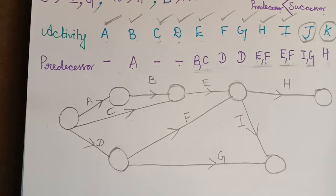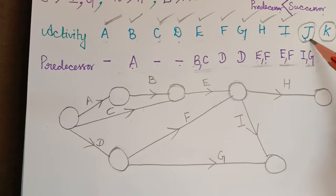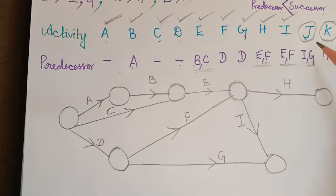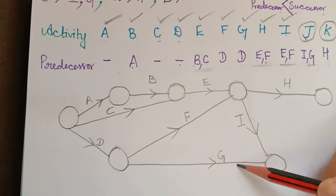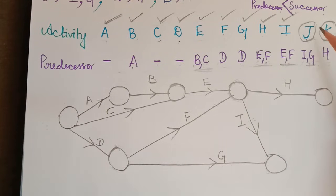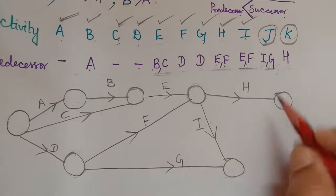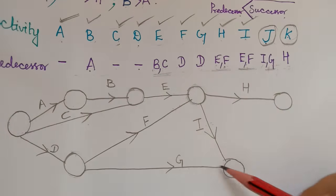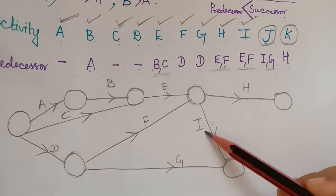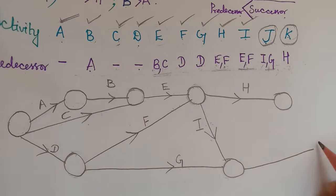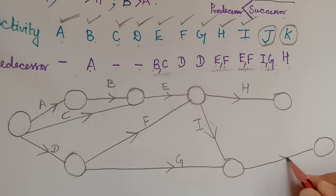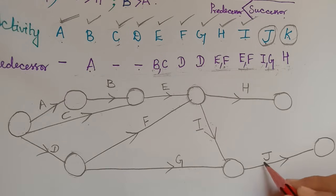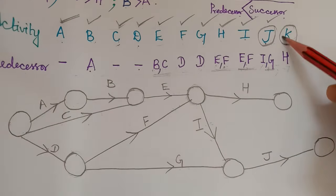Activity I is completed. Now for activity J — its predecessors are I and G. J is an end activity, so it leads to the final end node. The starting point for J is the shared end node of I and G. We draw an end node and connect activity J to it.